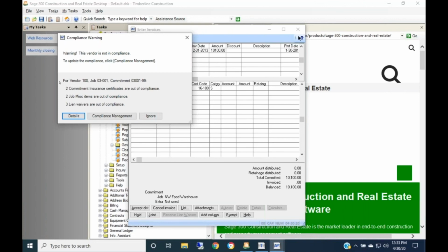If you set a commitment up in job cost, it doesn't bring it onto a report in PJ. So you just like to be consistent. If it's using the PJ change management, then do everything for that one in PJ. Otherwise, you're doing everything for it in job cost.